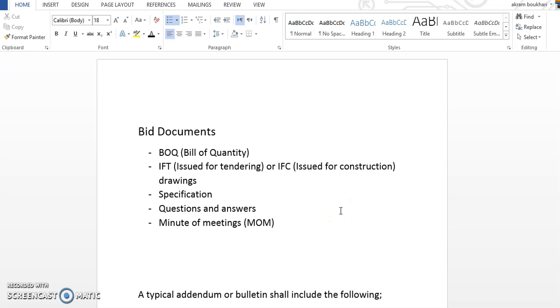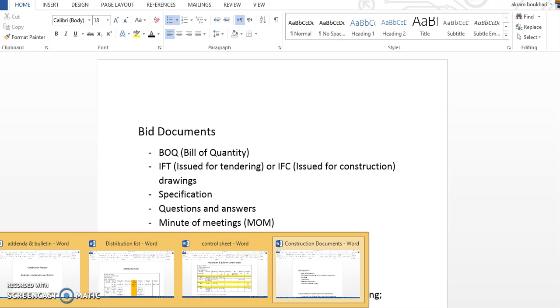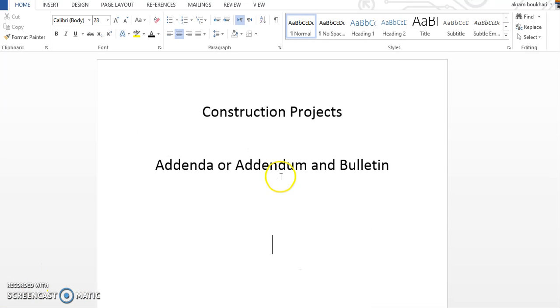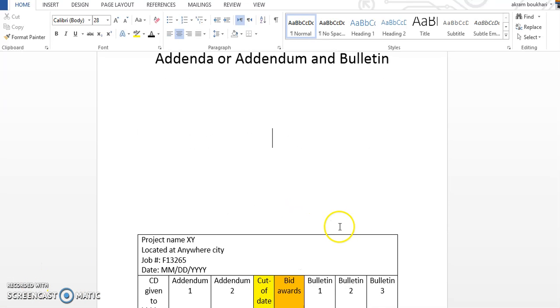So what does addenda do and where is it applied? First of all, before I speak where it's applied, let me define it first. Addendum is used to issue revisions to construction documents after bid documents are given to a bidding company, but before bid award. Revisions issued via addendum have no cost input. So what does this mean? Let me show you an example like a timeline.